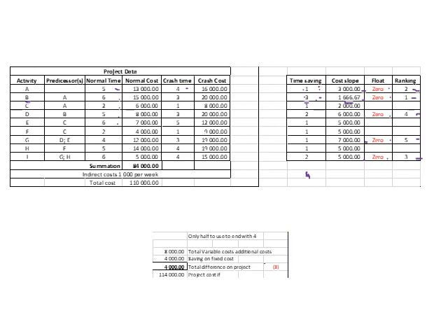Okay, so basically what we've calculated now is we're reducing our project time with 4 weeks. So we know we've got 1 week where we're going to have an additional cost of 3,000 Rand that we have to add to the project, and we're going to have 3 times 166.67 to be added to our project, and that is calculated at our variable costs at 8,000 Rand.